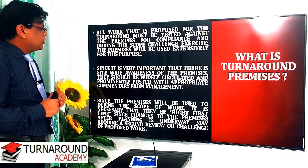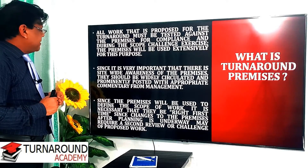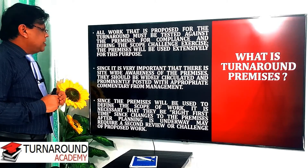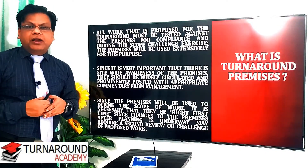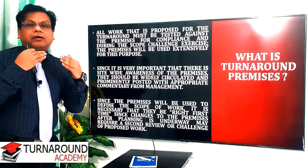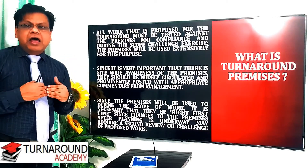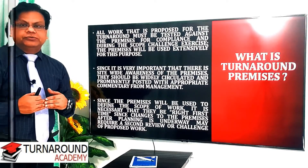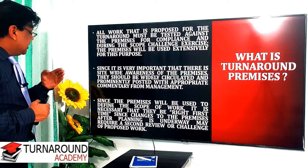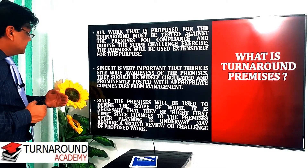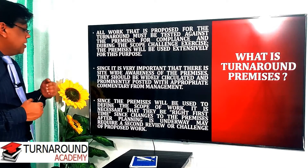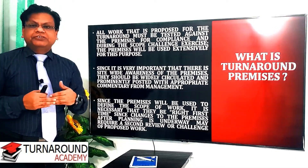Since it is very important that there is site-wide awareness of the premises, they should be widely circulated and prominently posted with appropriate commentary from management. You need to make the stakeholders aware about the premises and what policy decisions have been taken by management. Since the premises will be used to define the scope of work, it is necessary that they be right the first time, since changes to the premises after planning is underway may require a second review or challenge of the proposed work.